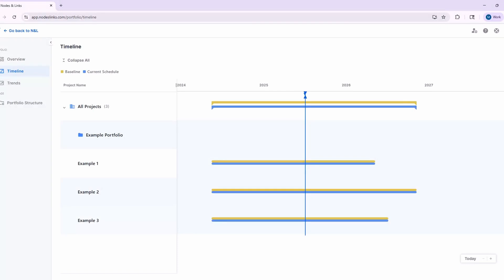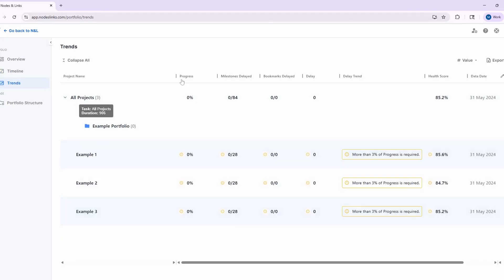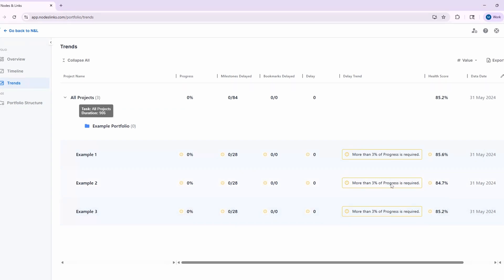If mapping all the databases and recreating reports in Power BI seems too complex, there are other solutions. One that I like is Nodes and Links — you can quickly create a portfolio schedule by simply uploading your schedule to the software. Here on the screen I have those three example schedules, which took me maybe five minutes to set up, and I have a nice timeline I can dive into. Nodes and Links is a specialized scheduling tool, so it will give you specialized scheduling data that will far surpass anything you could build in Power BI, with trends, milestones delayed, overall delay, delay trend, and a health score all available.